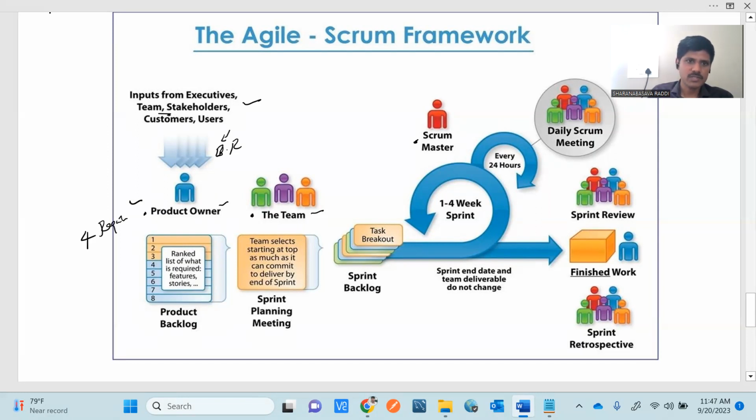So once product owner collects those requirements, he will go through these requirements and he will understand among these 4 requirements which one is the first priority one, then which requirement is the second priority one, and which one is the third priority one, and which one is the fourth priority one. Means he will arrange the collected business requirements on a priority basis.